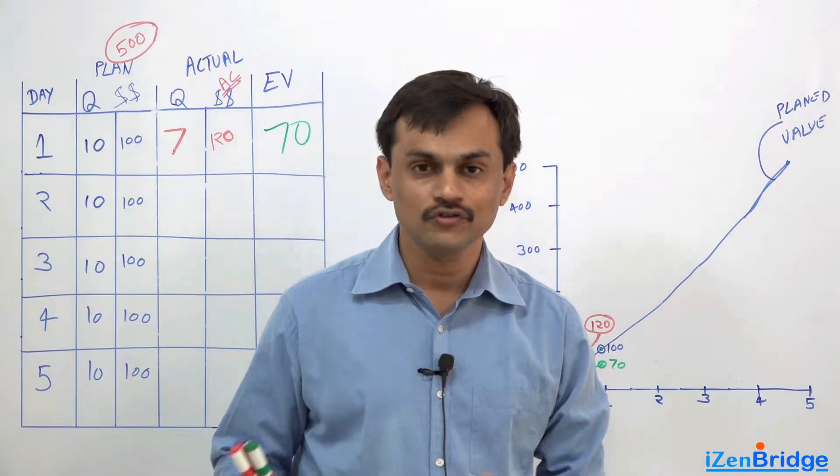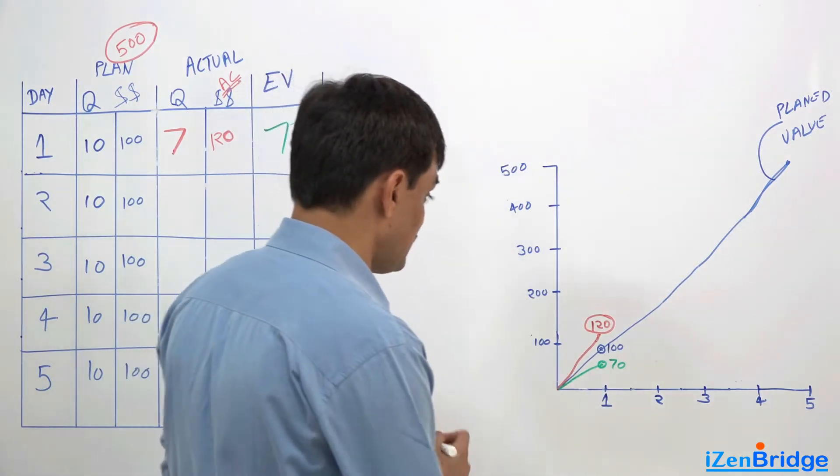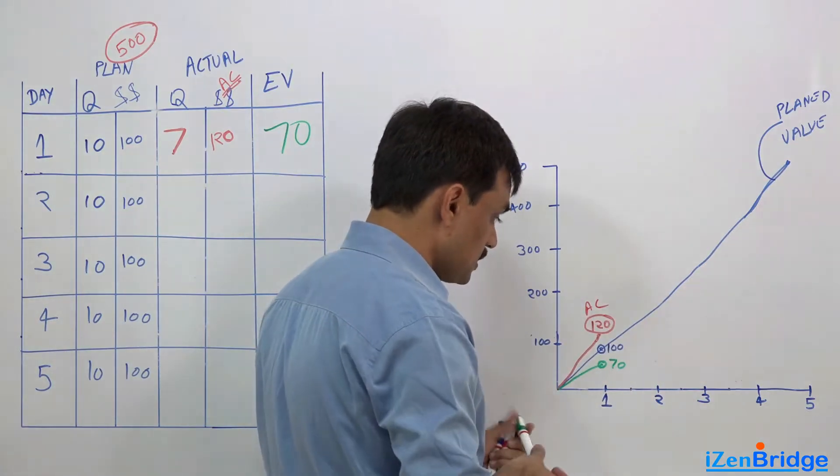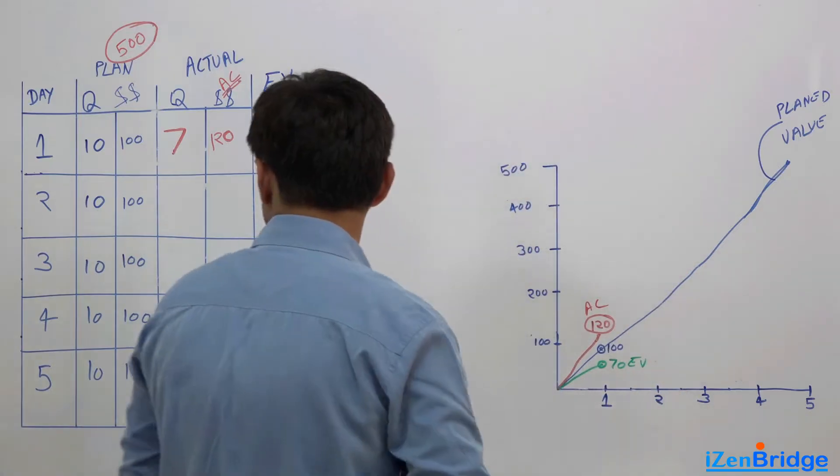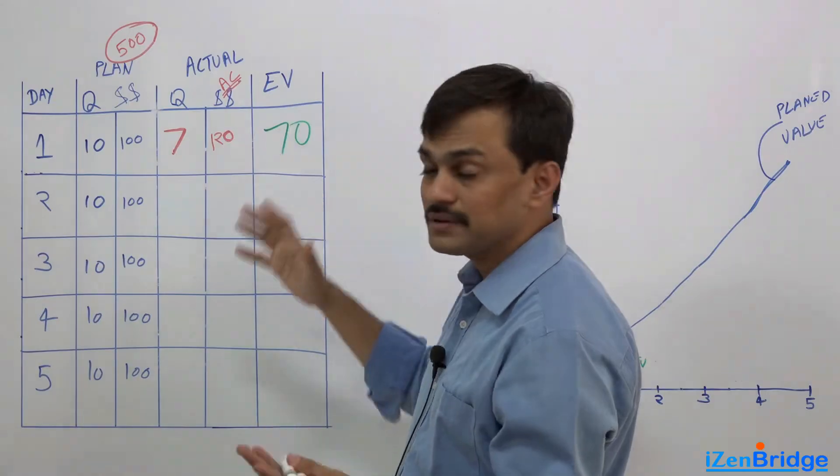So, let us take this understanding of earned value forward. As we saw, that red line is indicating actual cost, the green line is representing earned value, and blue line remains as planned value. So what we got, we earned $70 from day 1.